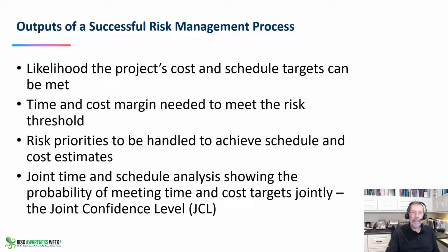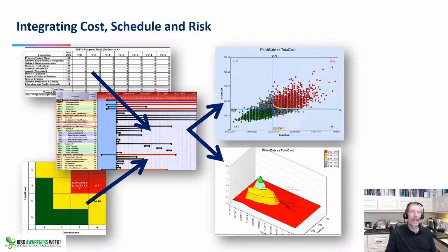That cost and schedule modeling is called the joint confidence level. It usually is not seen in the construction world because a lot of that stuff is firm fixed price, and this is the 30th time they've done the freeway repaving, so they've got fairly low risk except for the weather. But in any kind of discovery design project, you want the joint confidence of showing up on time and on budget. So here's the way to do that.